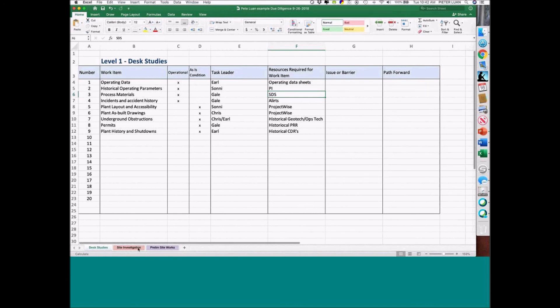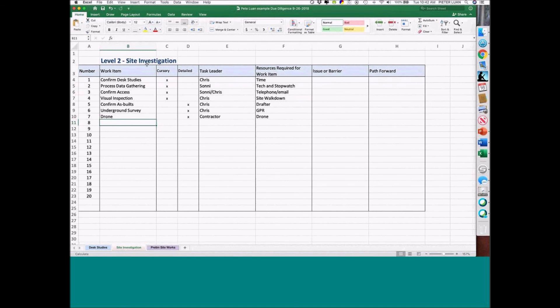So then you take all this data from desktop studies and go out to the field — that's why we call it site investigation. We talked about cursory and detail. So cursory: you're confirming all the data you gathered, confirm access, do an overall inspection. And remember the key thing: you have lengthy discussions with operations and maintenance. The operations people are going to want to help you — they don't want to see the turnaround extended any more than you do, and they want the equipment up and running.